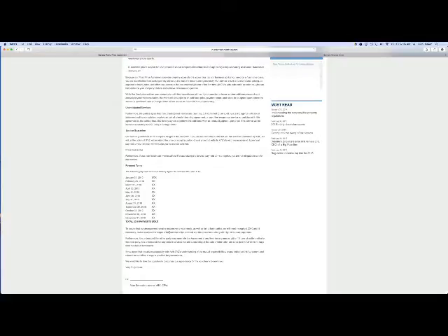And then it says to assure that our arrangement remains responsive to your needs as well as fair to both parties, we will meet throughout the year, and you could set that up quarterly, biannually, whatever, and if necessary, we can revise or adjust the scope of the services to be provided and the prices to be charged in light of mutual experience. In other words, this isn't carved in stone. We can revisit this because if you're growing, if you're putting more demands on us, whatever, we can adjust these prices, and either party can do this. So that's, I think, a very important clause.